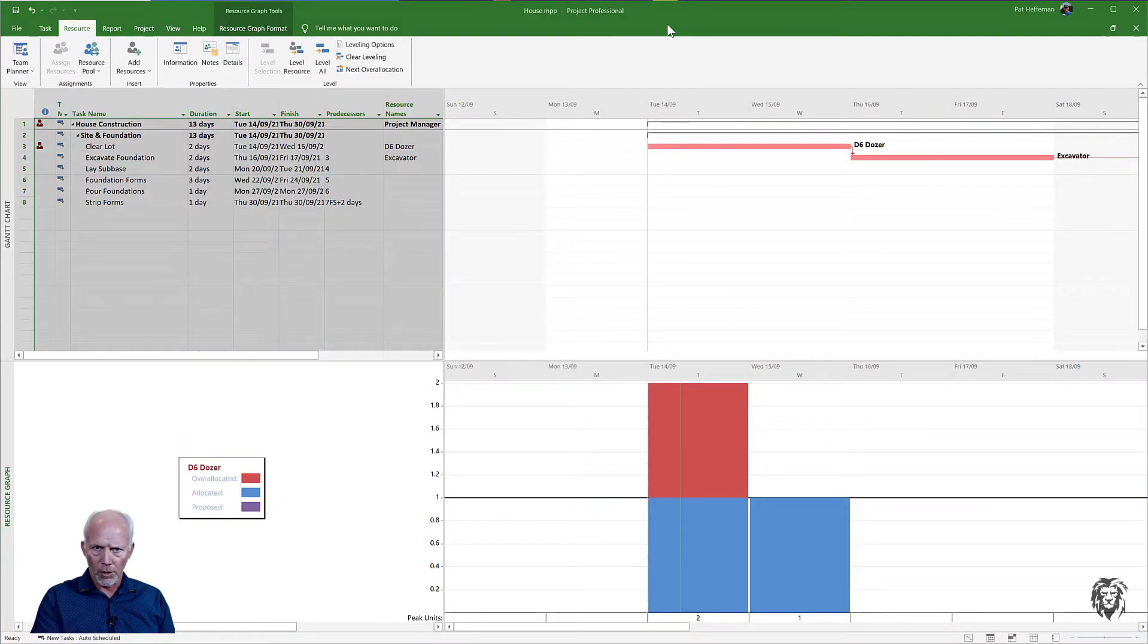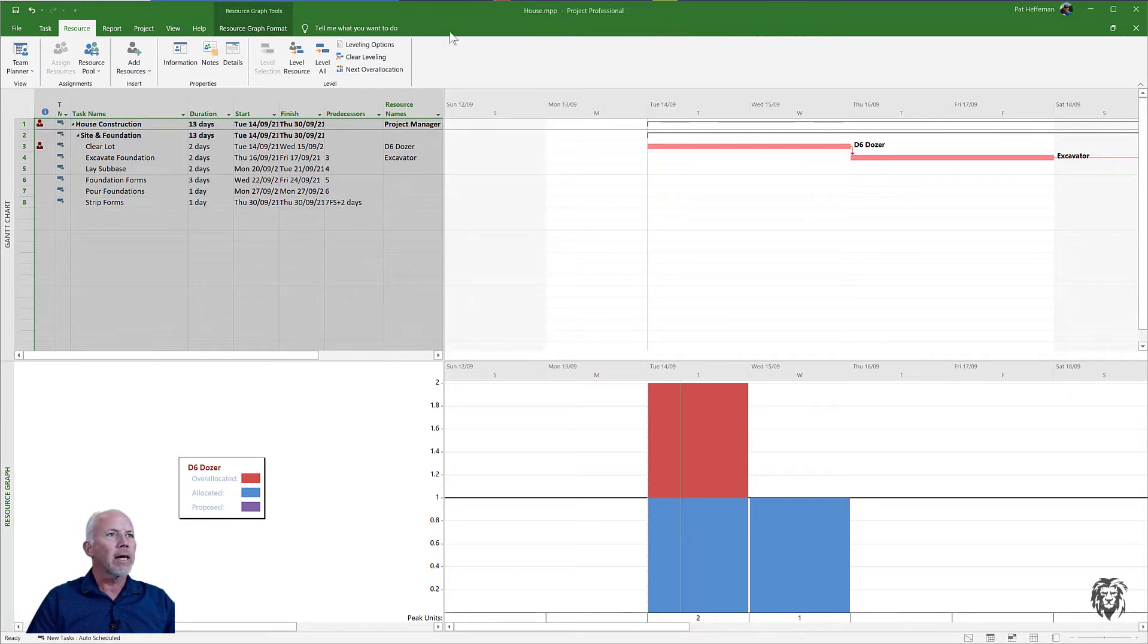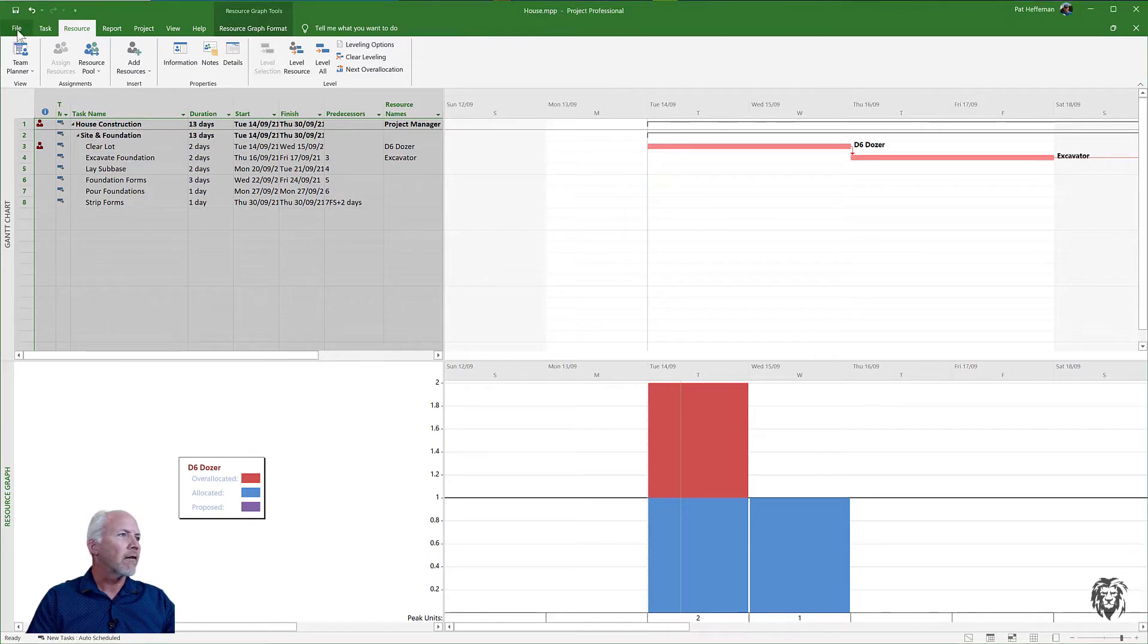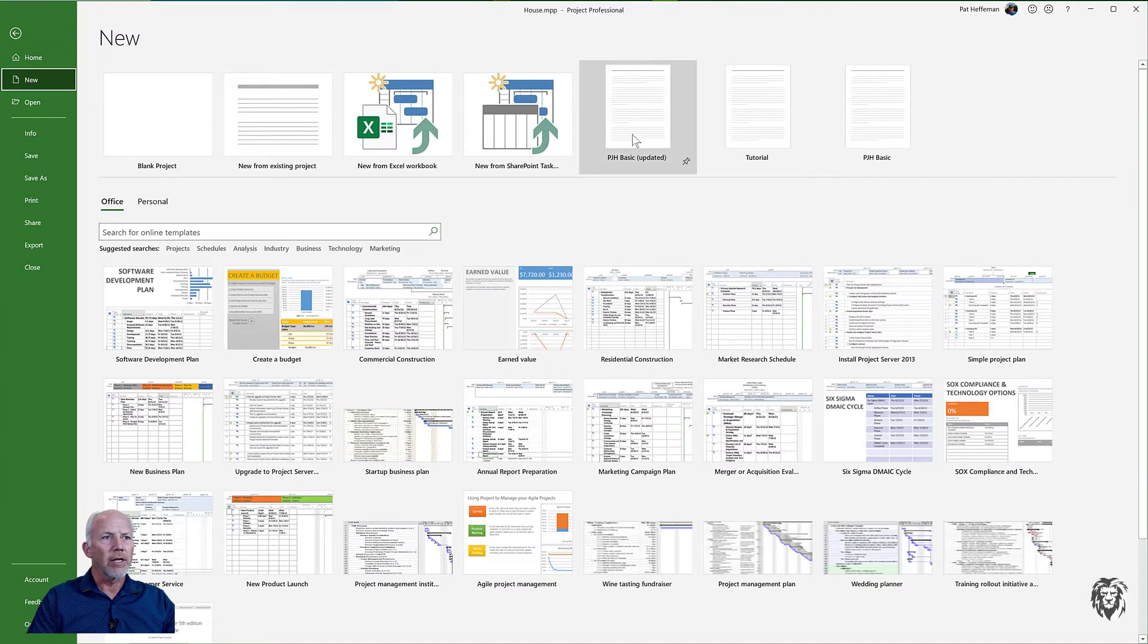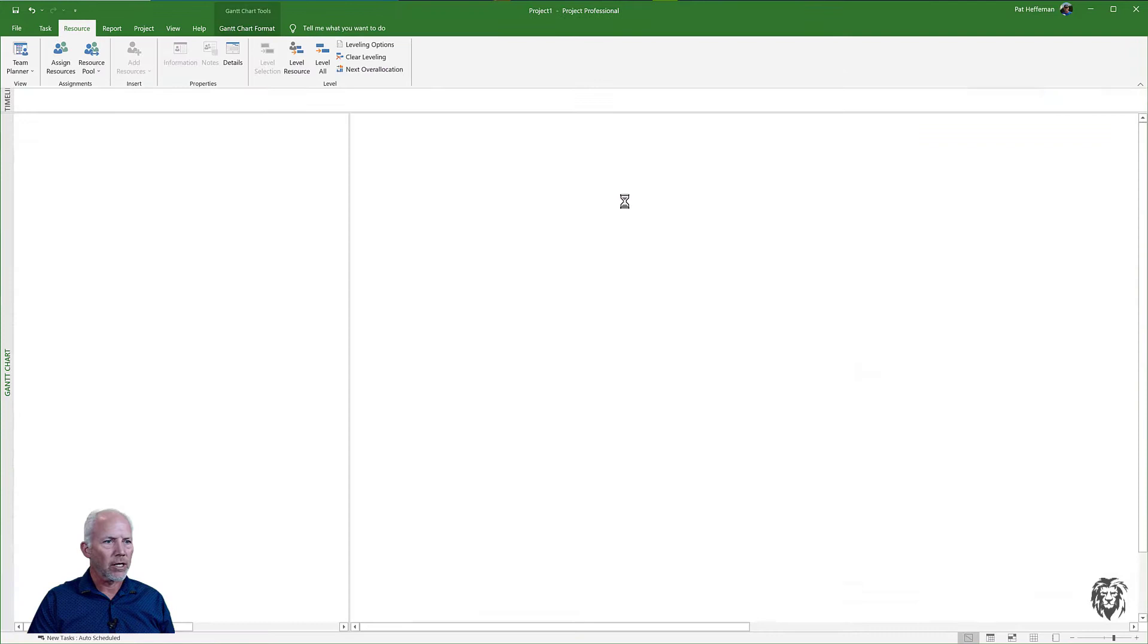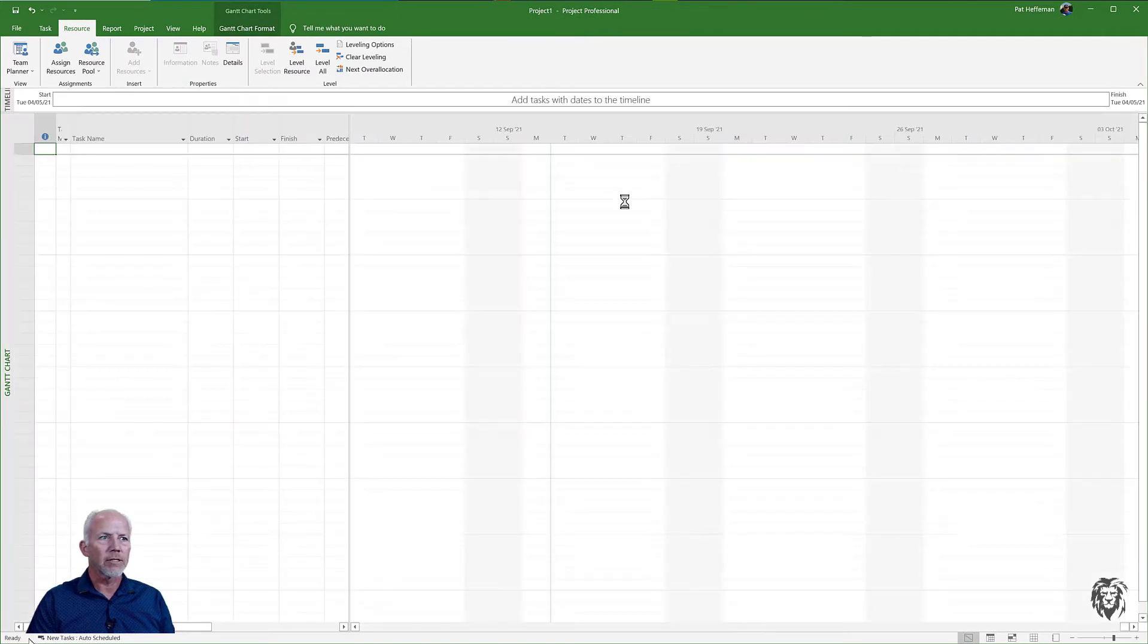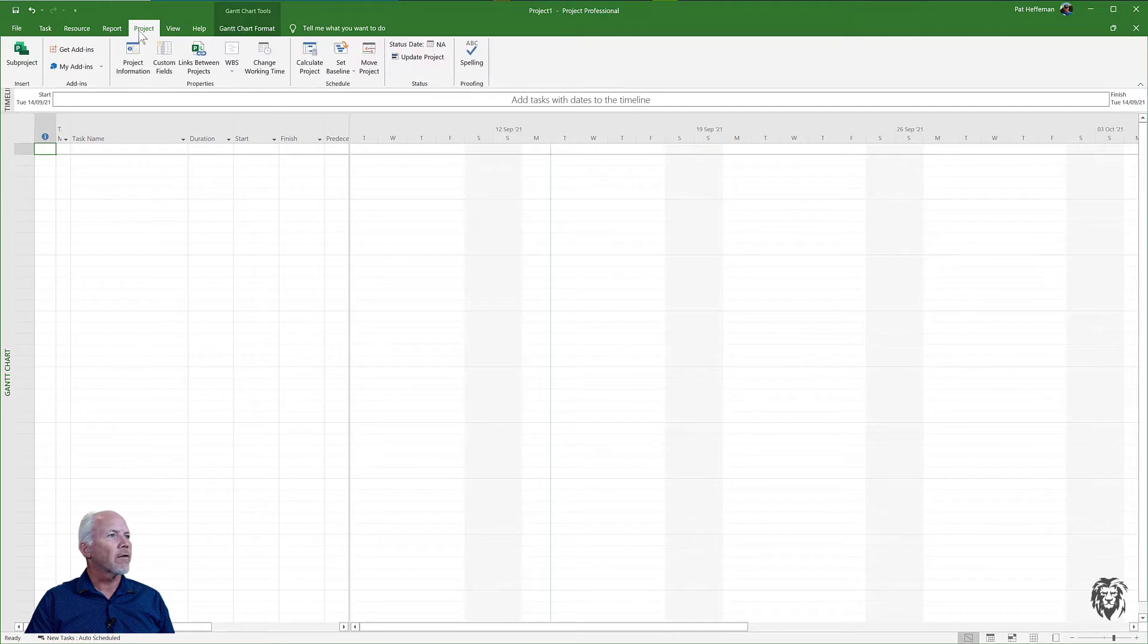I've got my two project files open including the resource pool, so the house project and the garage project. I'm going to create a new project file, so I'm going to go to File, New and I'm going to use my template so I get all of those formatting choices that I've made that I want to use as a common basis.